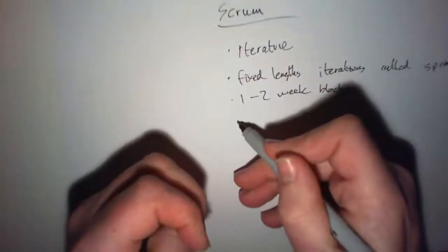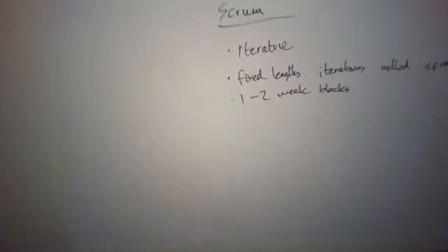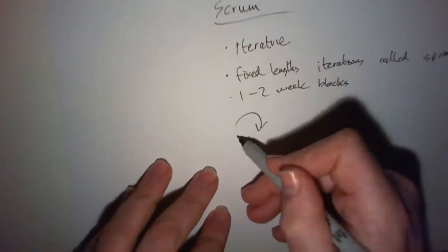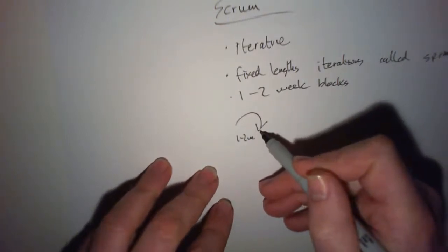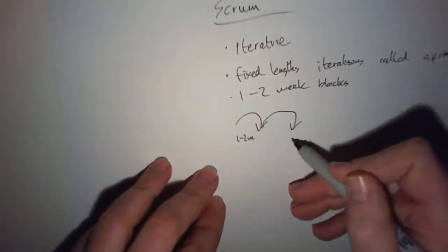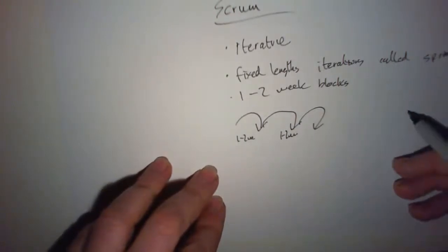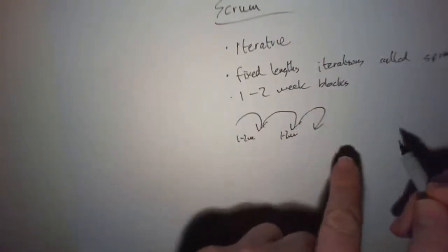What happens is, I suppose, you think of the one we just had. You think this. So what will happen is that you'll do the first thing. You do the planning, 1 to 2 weeks, and then you stop. Everyone stops, and you have your debrief, and then you push again, another 1 to 2 weeks for the next stage, and push again for the next stage. Now you can still go back at any stage, and it is iterative, but you're pausing every so often. This is the Scrum idea. You're pushing a little bit, push a little bit.